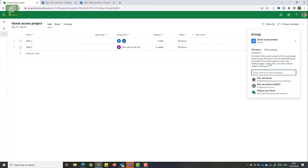With this access to the group, I as an external resource now have access to the project as well. So let's see that in another browser.